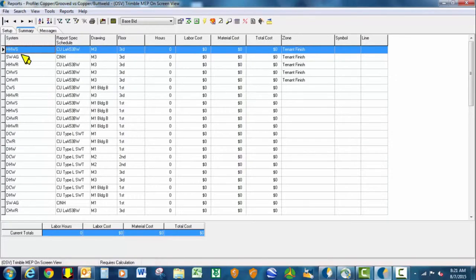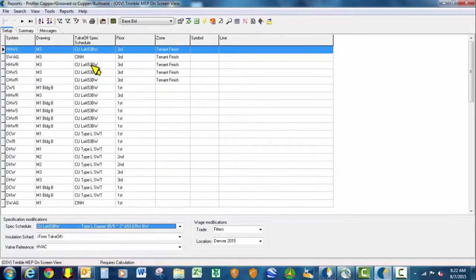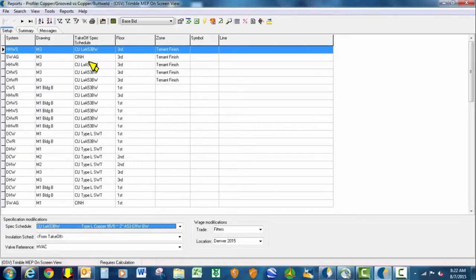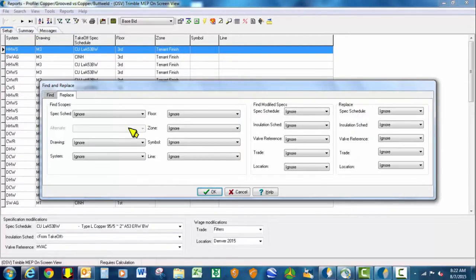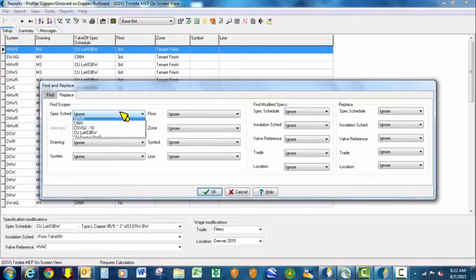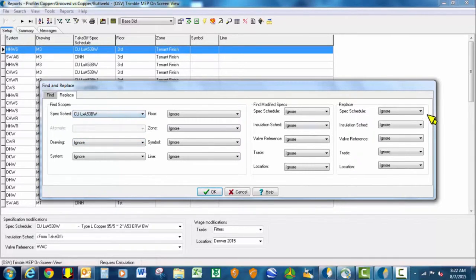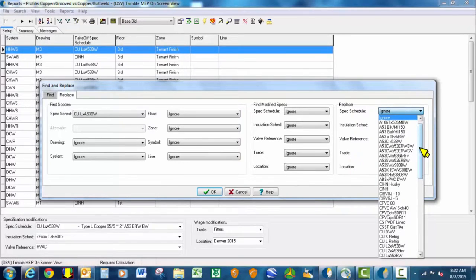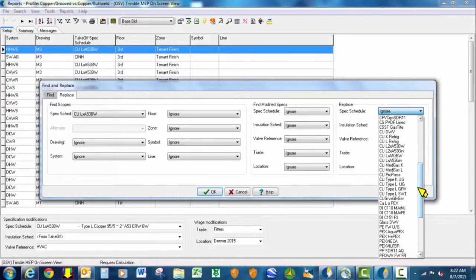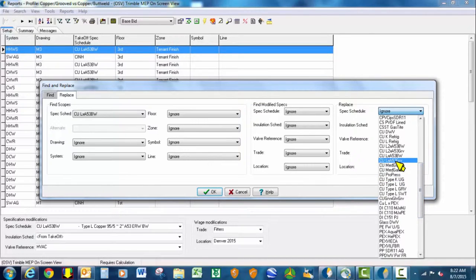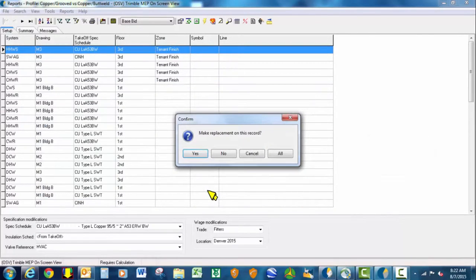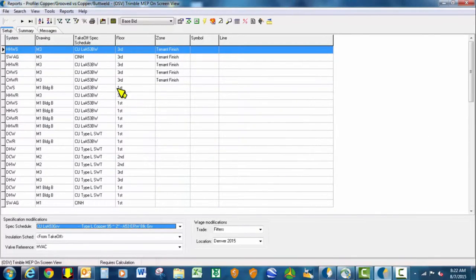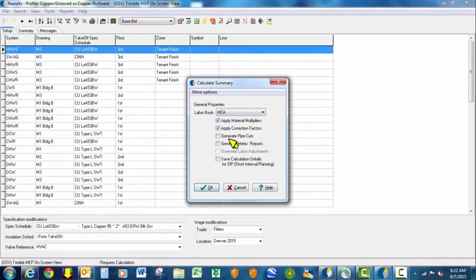We're going to change all of the copper by butt weld specifications to the copper by groove to see what the labor and material differences are. We'll go up here to search, replace, tell it to search for the copper by butt weld spec, and change it to the copper by grooved spec. We select OK, select all of those, and then recalculate it.